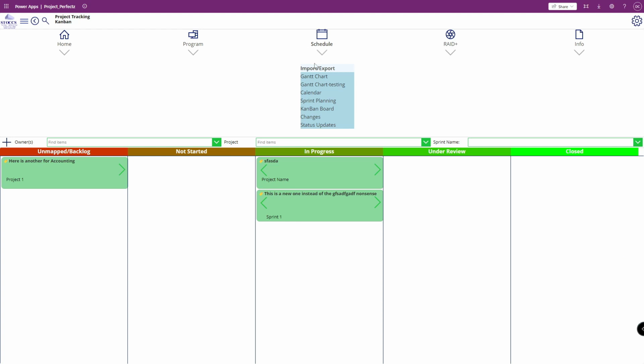But for very large programs, I would fully assume that people are using their own project tracking tools, and this is really to raise it up to the level of the overall program so that you can keep track of high-level milestones along the way. That allows people the flexibility to use their own tools for their own individual projects, but the overall program has visibility throughout.